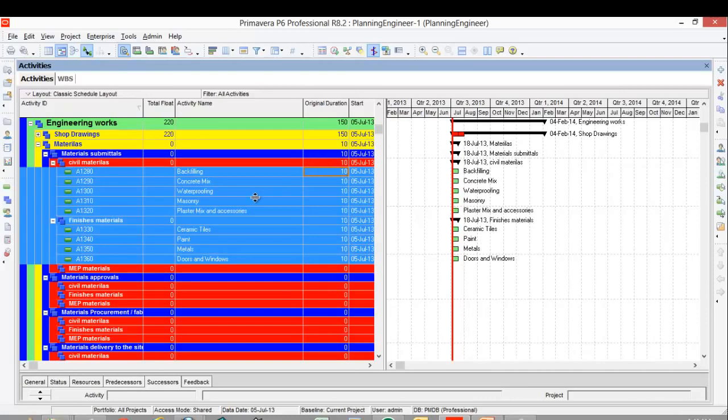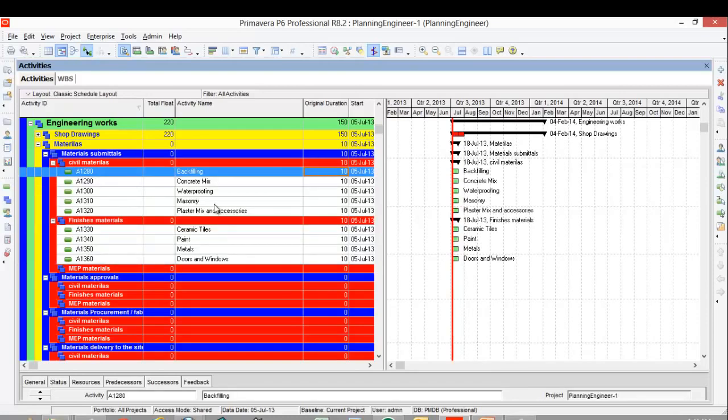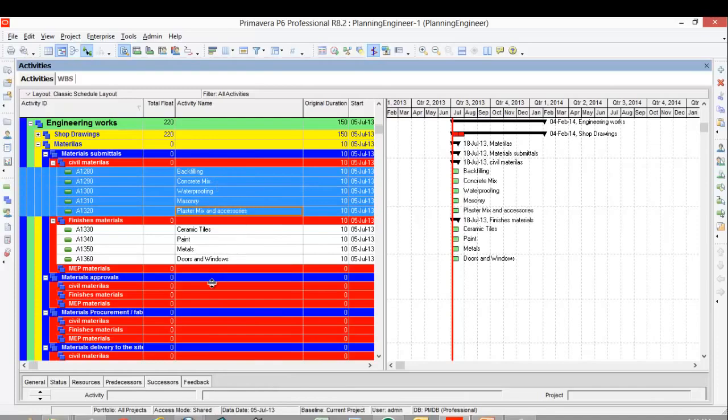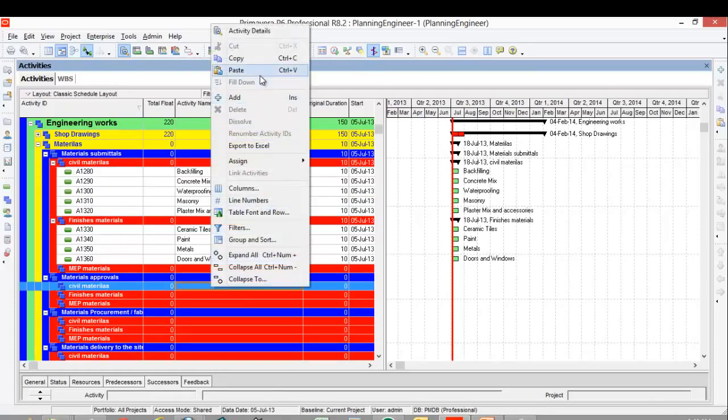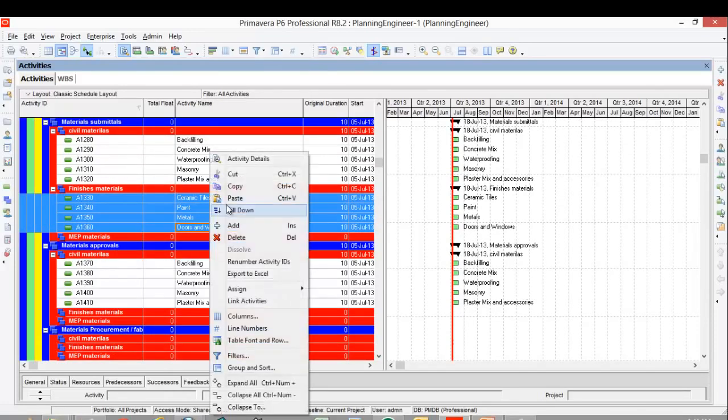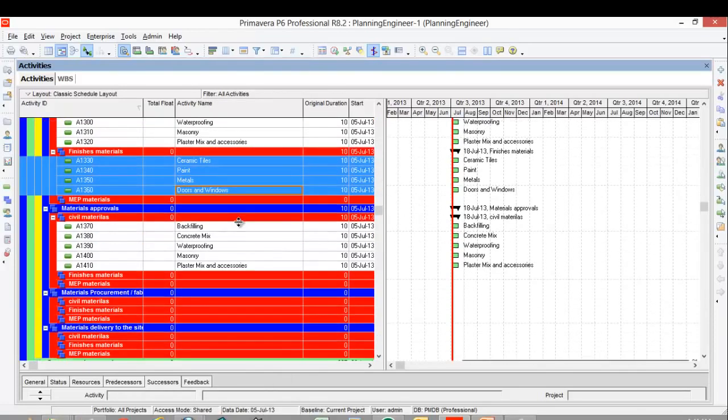The submittal, and we'll keep the same duration for the approvals as I told you earlier. This duration should be confirmed by your technical department and according to your contract. In this case, you should confirm it from the procurement department. So I'll paste them here.